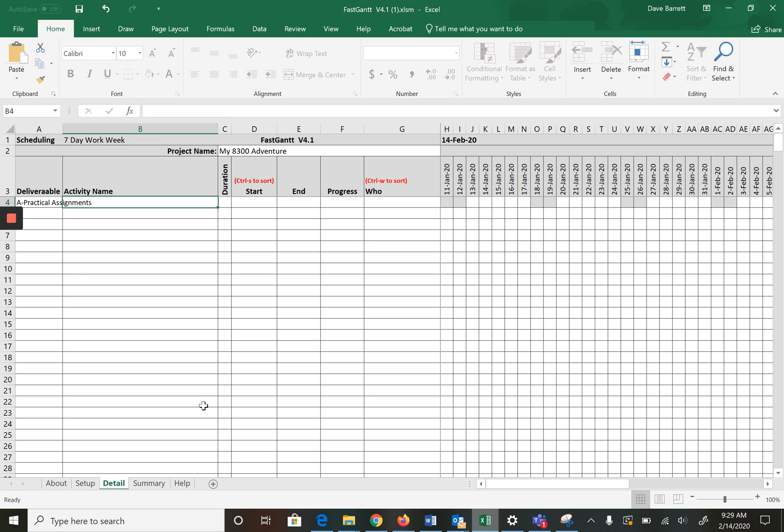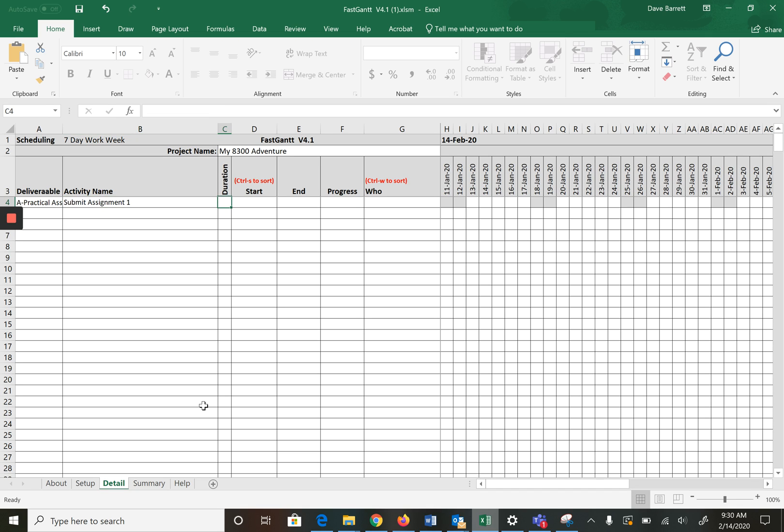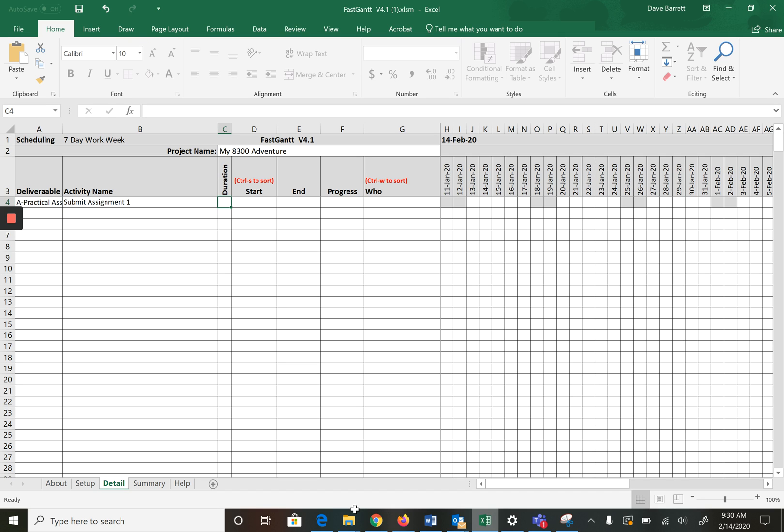Let's go back and we will say which deliverable. Well that is a practical assignment deliverable. We will now put submit assignment one. We'll say what is the duration. This is where we're getting into scheduling. How long are we going to work on assignment one? Remember submit assignment one includes all of the work to do it, so we might say that'll be over two days.